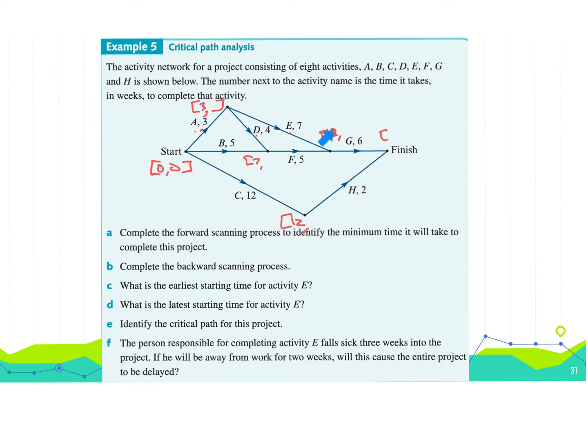Now we're considering from 12 here, 6 will be finished at 18. That's the earliest time we can be finished. At the top there is 18. If I go this way, I'll be finished in 14. So realistically, this has a float time then of 18 minus 14, which is 4 hours. So we can choose when we start that one without delaying the project. So we'll put our 18 in here, okay, and then when it's to finish, we put another 18.